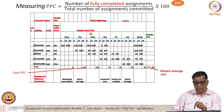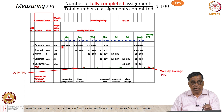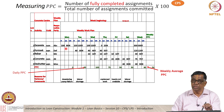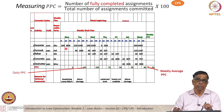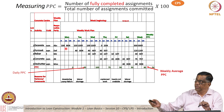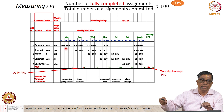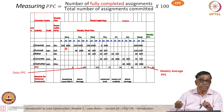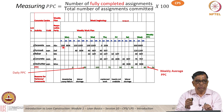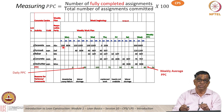The definition of PPC is always the number of activities which are fully completed — 'fully' means totally, you don't have to go back to the place again. So if I complete 80 out of 100, I don't get 80% as PPC — I get zero. And if I do more than 100%, it's not useful to the subsequent activity. The subsequent activity man is only waiting for 100% of the work to be completed. If I do more area than planned, that additional area is not planned for, so it's actually work in progress. We want to avoid waste — whatever you promise, do that much. You don't get a higher PPC beyond 100.